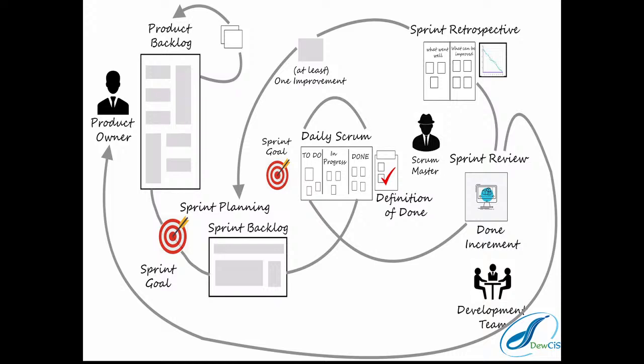And by the end of the sprint, maybe 2 weeks, then you can even do a demo, even though it's to your team. Then you're like, now we have a social media page, we already have this number of people following us, these are the graphics. Within that demo, somebody can raise that the graphics look so bizarre, they don't represent you. That means within that is a new backlog, product backlog that has originated.